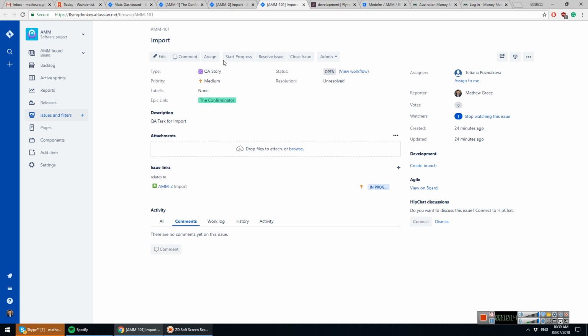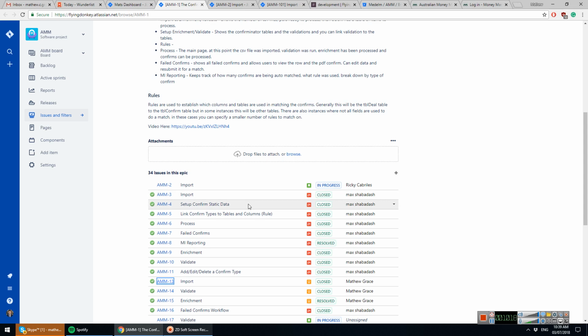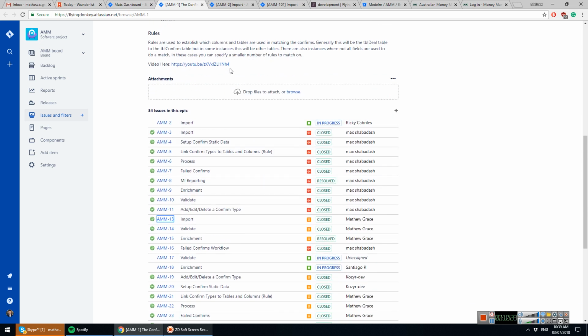So as a BA, you'll be in charge of creating the tickets. Generally speaking, I'll create the tickets to start with, but once we get into the flow, I'll expect you to create the tickets. But don't stress for now. I'll then assign you the tickets and say, here's the task. So you'll have a design task, a UI task, a development task, and a QA task, and then you effectively have to just fill those in, designing the process and watching it through. Conceptually, your idea is to just monitor the tickets and make sure they move through the process.